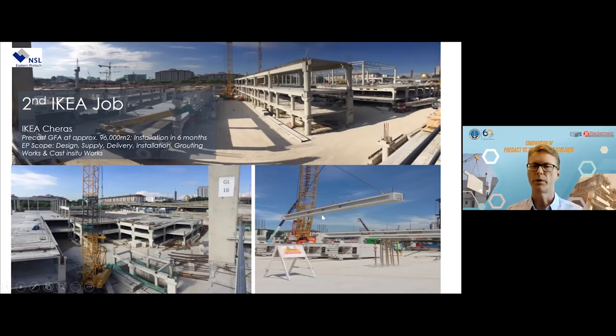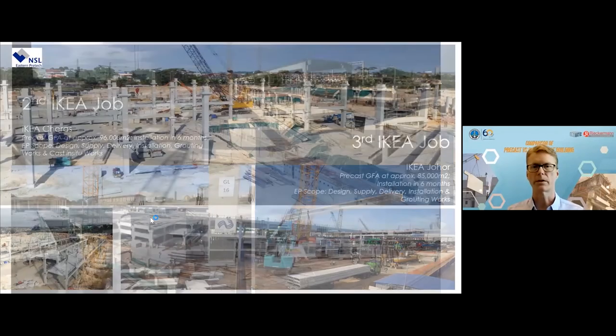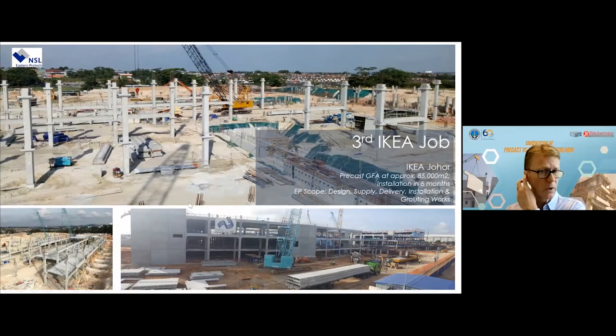With a 16-meter beam, you can't run your services through unless you provide openings in the beam, as you can see here. So we provided openings in the beam to be able to run your firefighting and your ducts through the beams and maintain your headroom. So again, same thing, we're working two floors underground and then the rest of the building is above ground. So what you see here is this level here is actually ground level. Same thing, 6 months.